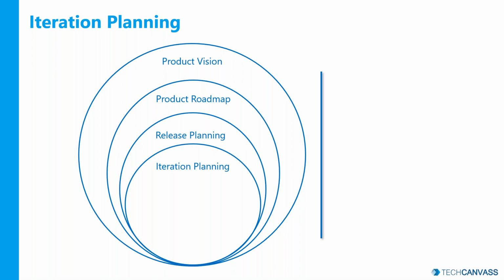Okay, this is where the team is doing actual project execution. So far, whatever we have been doing is only project planning. In iteration planning is where the team initiates the project execution. Right? So their scope of work is limited to the sprint, what they need to achieve in the upcoming sprint. So a number of iterations make a release. Okay, you may have a predefined release cadence in your organization. You may have a predefined duration of a sprint in your organization, and you can club them together, and these iterations together make releases, right?